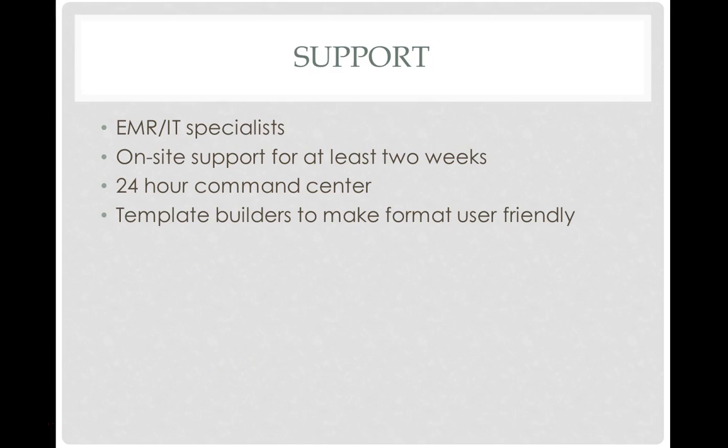Support: you've got to have plenty of IS specialists on site during initial go live, and then at least 2 weeks on site, and they have to be available at the drop of a hat. Usually they put a couple in every unit. And then the command center, it's open 24 hours. They're available by phone. They can remote in, and if they need to, they can send somebody on site. And the specialists help build your templates while they're there to format it the way that fits your needs.